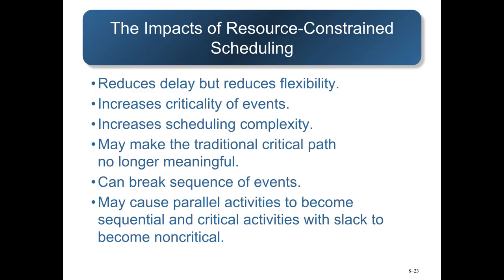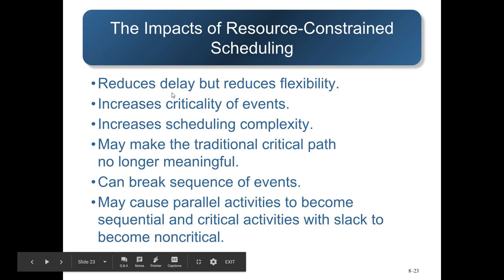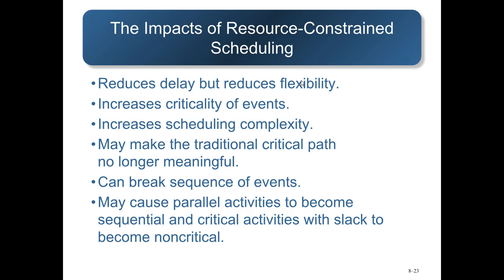So the following are the impacts of resource constrained projects. First, it reduces the delay but reduces flexibility, since resources must be strictly followed in relation to their limitation. Thus, commitment is key to this one. Next, it increases criticality of events. It was clearly seen wherein the critical path was changed considerably.